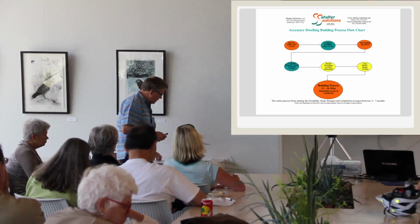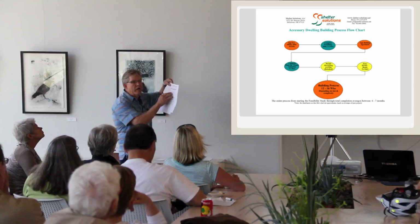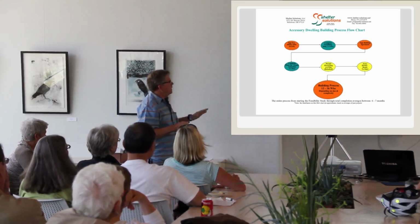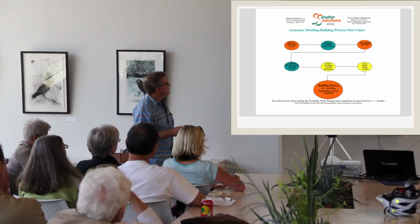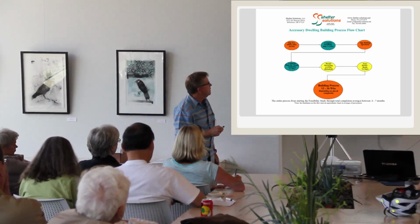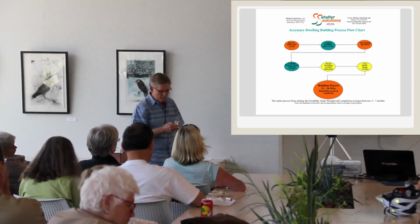I have extra copies of these up there too, if you'd like a copy. This is what I do for my customers as the first step. It itemizes everything that you're going to need to do, or you should. So here's the timeline. For my customers, it takes about 3 to 5 weeks to put together a feasibility study of all those components.